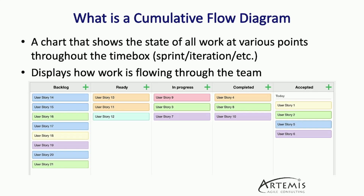A cumulative flow diagram is simply a visualization of the work as it flows through the different work steps of your flow. In this particular example, you can see we have five steps based off of Rally software's implementation: backlog, ready, in progress, completed, and accepted. You'll see that there's not a design, build, test kind of structure here — in progress includes all of those things. We are trying to avoid creating silos between development and test on our teams, as breaking them out on our workflows tends to reinforce that mindset.